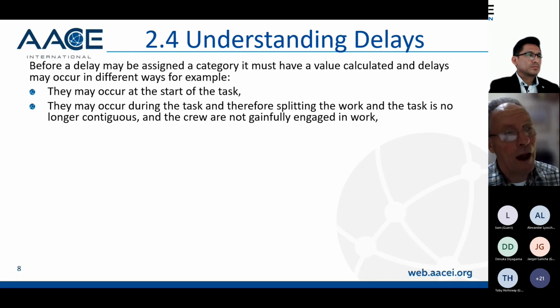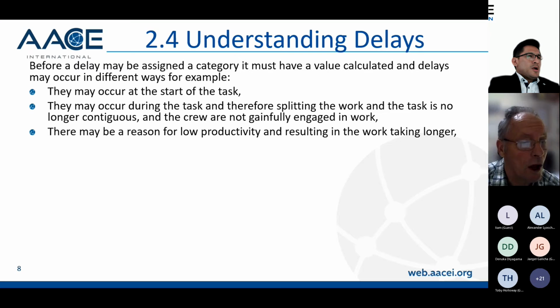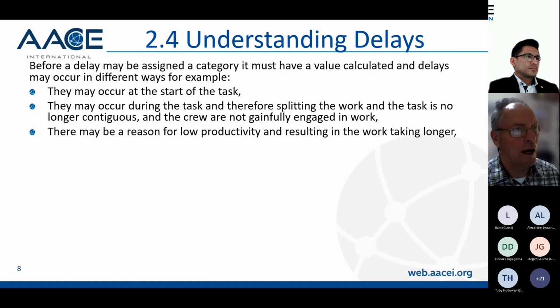The crew stops and then starts again at a later date. It may be a reason for low productivity. So again, the activity takes longer than planned. And so again, rather than having a fixed delay, the activity is extended in duration.